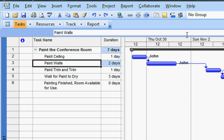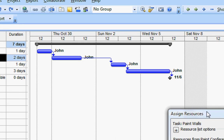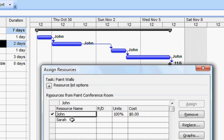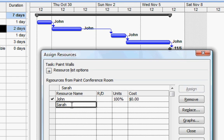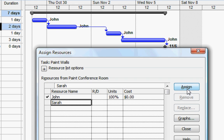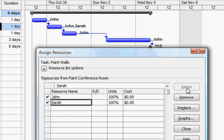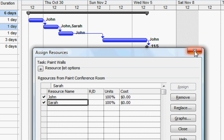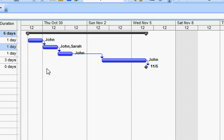Now, let's consider that I might want to have one of the trainee painters take part, or at least sit in the room with John while he's painting the walls, just so that the trainee can learn some tips and techniques from a master. What I'm going to do is assign our newest resource, Sarah, to just watch what goes on while John is doing that painting. But notice what happens when I do so — that two-day task, when I assign Sarah, Project reduces the task to one day in duration. In the real world, if Sarah is in there learning while John works, the work will probably take longer, not less time.